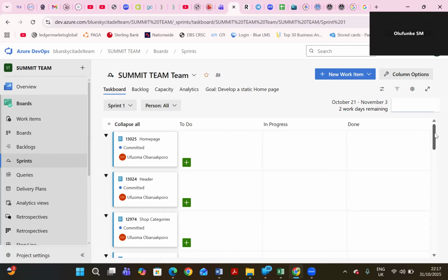Okay. So as Scrum Masters, I want you to do some things for me. It could be because it's an ad hoc one, so it wasn't planned on time. But you should have a particular day when you do your refinement. Let's say your refinement is done a week before the beginning of a new sprint. That gives you enough time to ensure that you've gotten in touch with everybody and they know they have to be at the meeting.